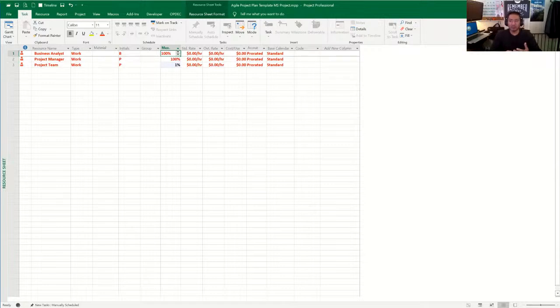That's being realistic, because in reality you're only doing 80% of the work; the other 20% you're getting settled in. You're driving to work, you're clocking in, you're getting breakfast, you're getting lunch. You're just keeping that time to get settled in and adjusting to your day-to-day grind. So 80% is feasible, I guess, but 100% is also done as well. But I try to influence 80% of max units.